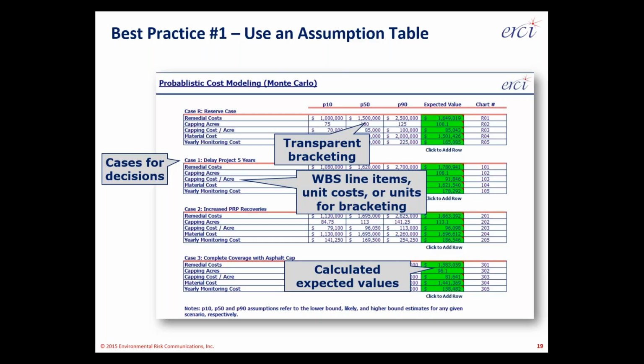But again, time and again, when you do the P10, P50, P90, have that peer reviewed, get everybody to say those are the right ranges of outcomes. Doing the last part, that green column that's labeled expected value, doing that takes 5 minutes. It's the easy part.